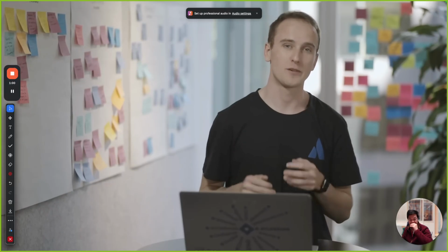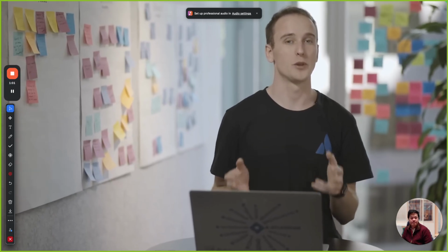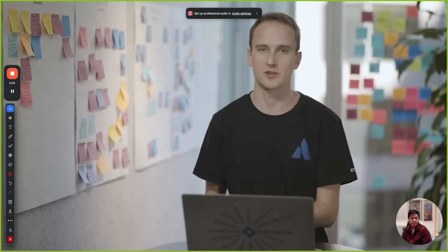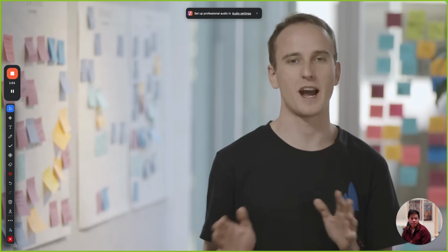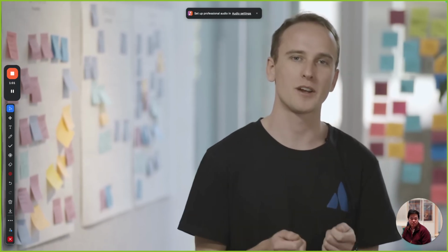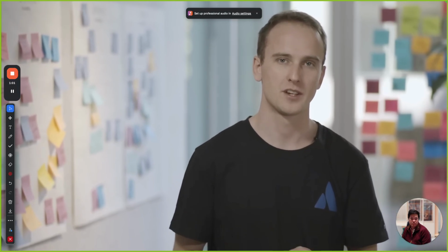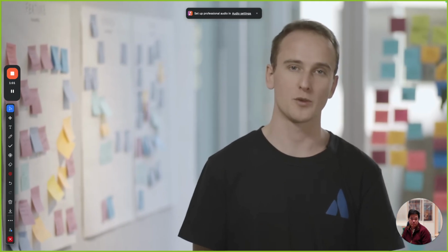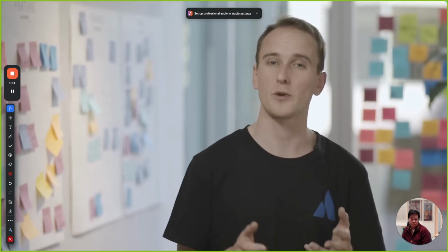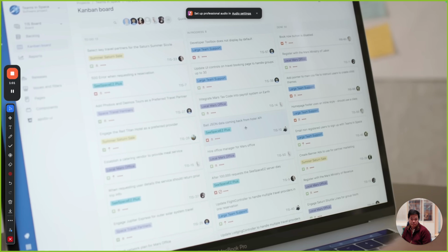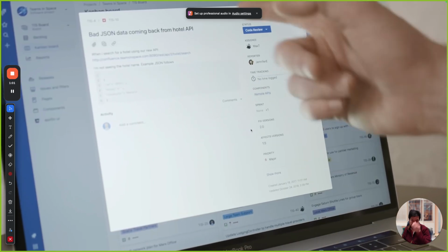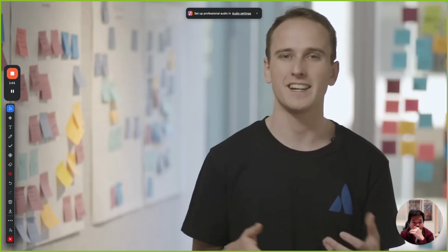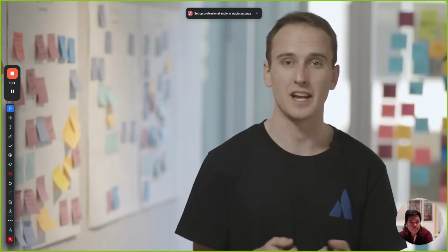For the Agile software developers among us, cards should be a familiar concept. You can think of them as one Kanban card per user story. For the rest of us, we can just back up. You can think of Kanban cards as being work items. One card per work item. You want to make cards for all the things you're working on and place them in the appropriate stage of the workflow. Kanban cards should have a title and a description and an owner. You can also add any other helpful information like a due date.